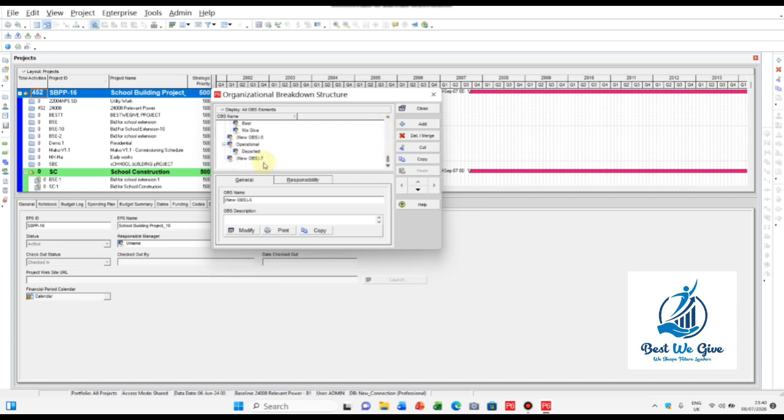I'll scroll it down first. Select this one. Now click on Add. For example, that will create Shola as the parent of the OBS. Click OK to save it. This parent OBS could represent a project director, department head or senior manager, depending on your organization.